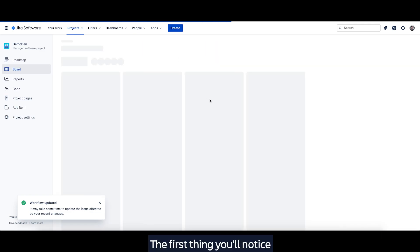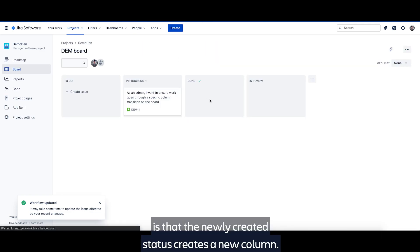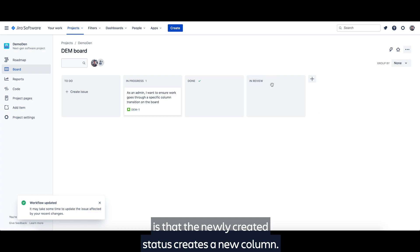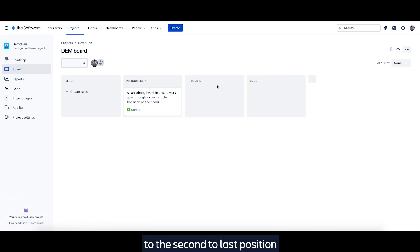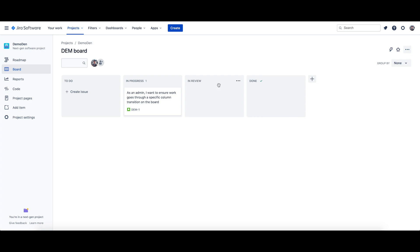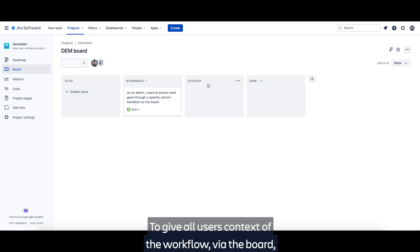The first thing you'll notice is that the newly created status creates a new column. Simply drag and drop the in review column to the second to last position to reflect our team's process.